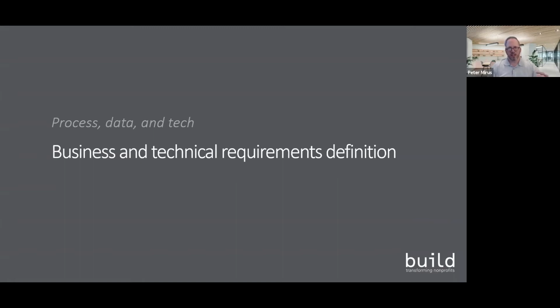Basically what I want to highlight here is that I think somewhere in the range of 50% of implementation projects fail, at least in part due to poor or inaccurate development of business requirements. So a business requirement example would be the ability to transfer a case record from one counselor to another within the same agency. And the technical requirements might include full data encryption for that data, both in transit and at rest, for all counselor, client, and case data.